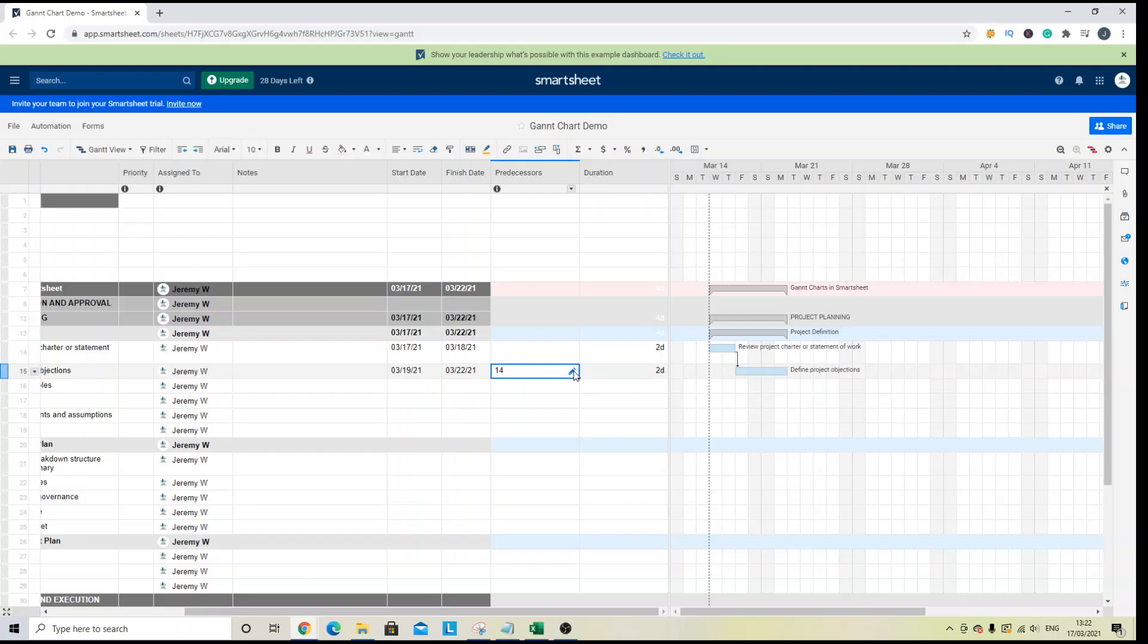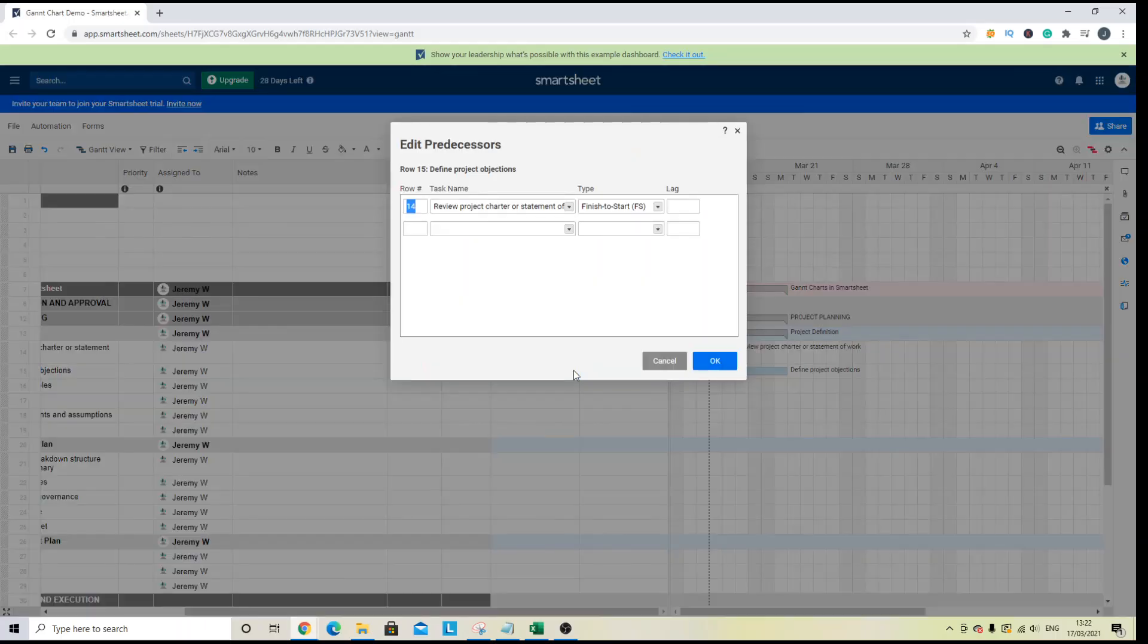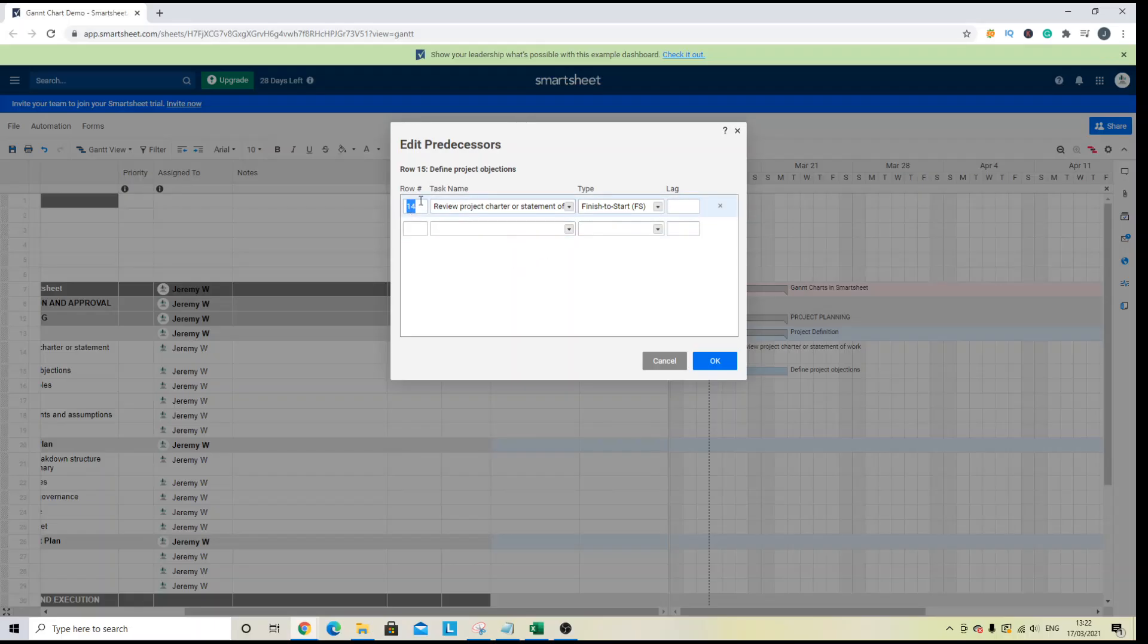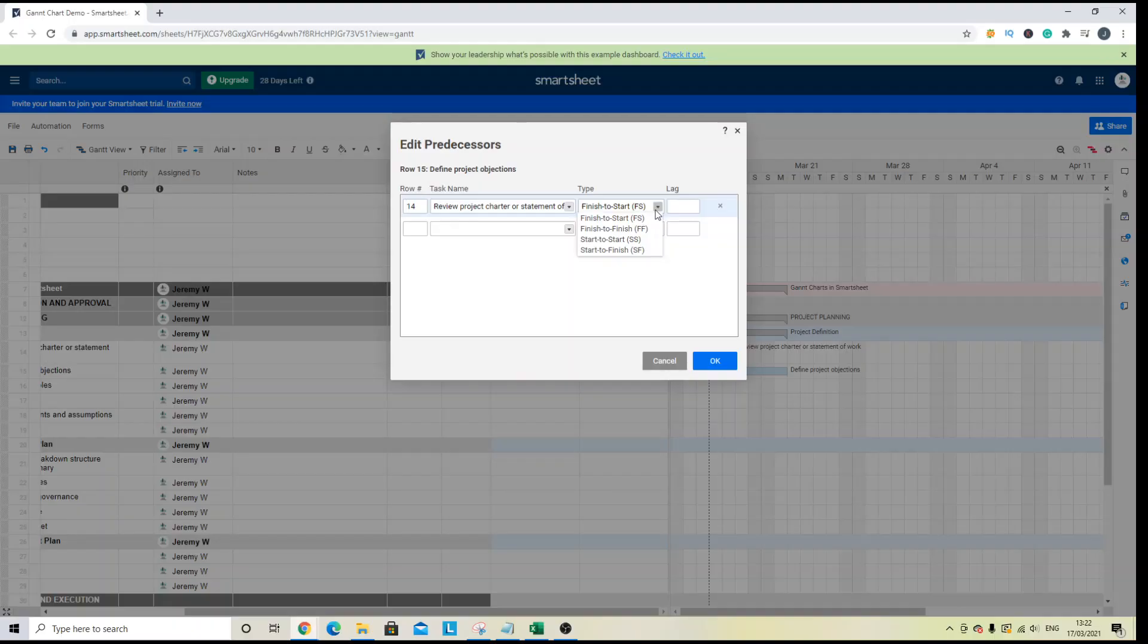Now, by default in Smartsheet, the dependency type is finish to start. So here we've got the row that we're talking about, the task name and the type of dependency that is established. But you can change the dependency type depending on how your project is to run.